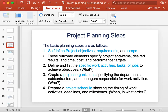The next step is to prepare a project schedule. After having identified what needs to be done and who will do what, we can determine the project schedule showing the timing of work activities, deadlines, and milestones. From this we can answer questions like when and in what order activities will be carried out.